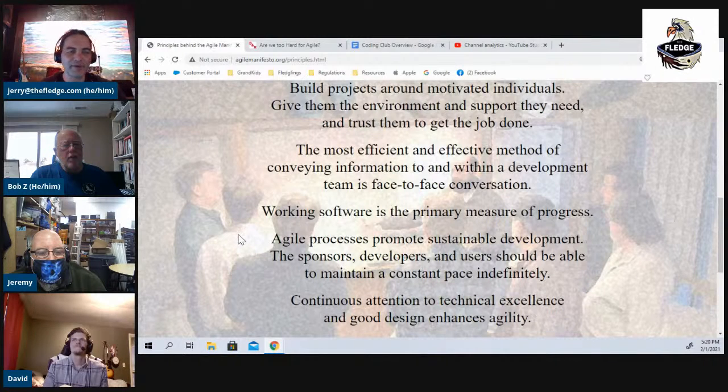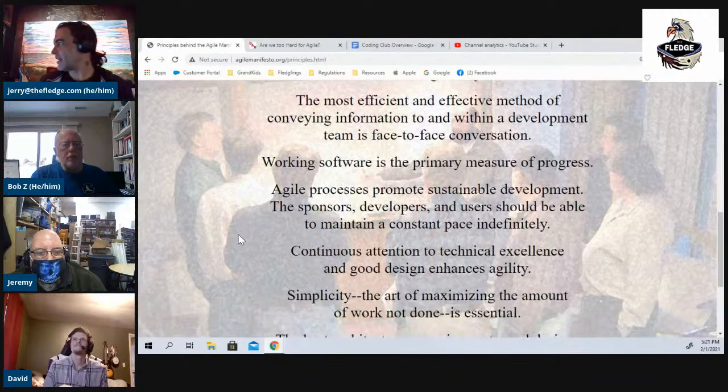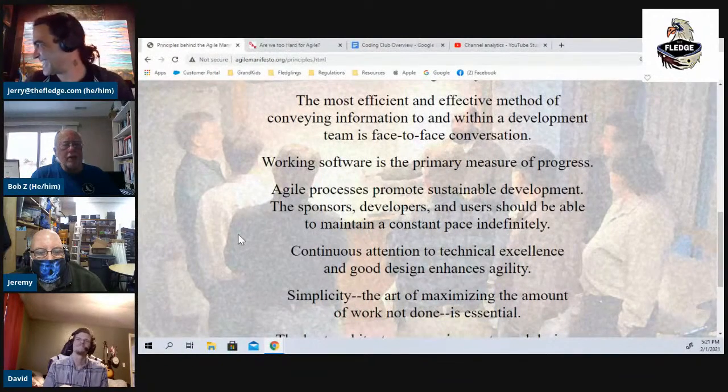And pretty soon you're just building technical debt that's going to come back at you in support. And if you remember, if I can fix it in the requirement phase, it's $1. If I have to fix it in the support phase, it might be $100,000. Getting a bug that takes down a whole banking system could destroy your company. So am I preaching? Yeah. Sorry. But sometimes we need it.